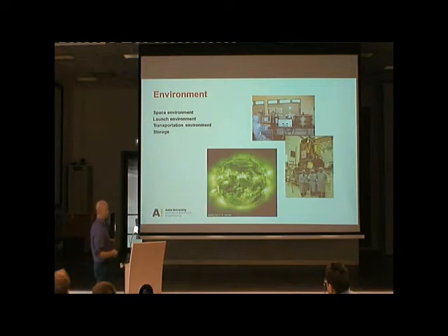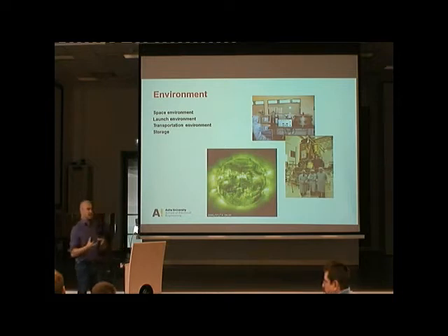And storage also. Some of the scientific instruments might be designed for use in a vacuum or in a radiation environment, and you might store it in an atmosphere, maybe even a humid place, and that will spoil your entire measurement, maybe.